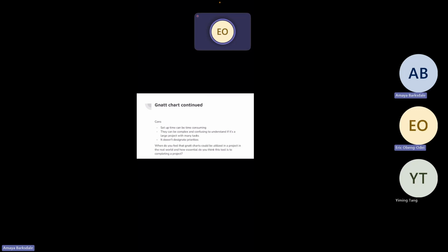So although it wouldn't show what is more important than what, with the RMF process we have phases like step 1 to step 7. Although the tool is not giving a priority to the steps, with experience we know we need to get step 1 done before we can move to step 2. The ISSM needs to approve step 2 before we can move on to step 3.